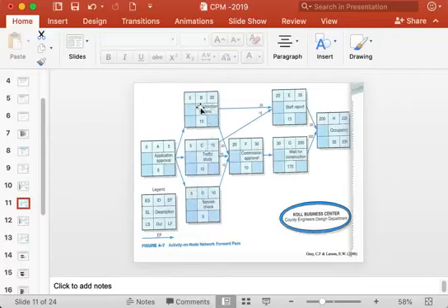Okay, and after 5 days, then this B will take 15 more days to complete. So then B will finish after 15 plus 5, 20 days, because B itself is going to take 15 days to complete after having waited 5 days for A to complete. So that is why B will finish at the earliest after 15 plus 5, 20 time units or 20 days.